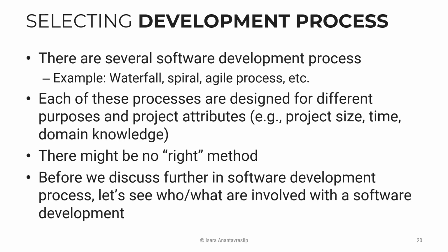All right, each of these processes is designed for different purposes and project attributes. For example, the project size, the time, and the knowledge about your application domain. For example, if the project is small, like 2 weeks, 4 weeks, or even 2 months long, sometimes Waterfall would work. You collect the requirements once, you design once, and you develop once, and then you